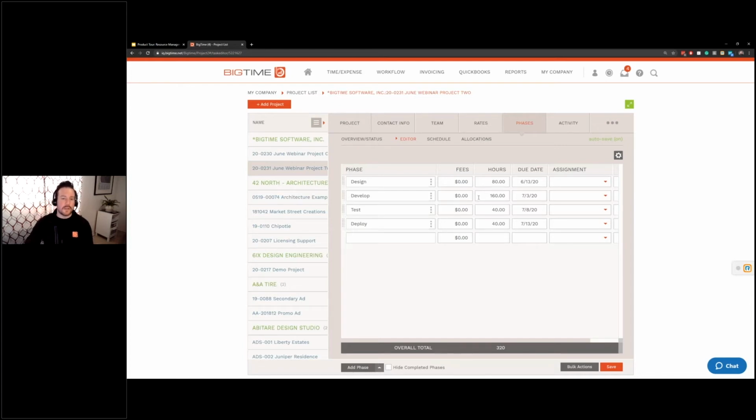But this should be, in the easiest sense, where do the budgets lie on that scope of work? So on this, the initial scope, I know I need about 80 hours for design. I'm gonna do 160 on development, 40 hours for testing, 40 hours for deployment. My due dates are set here already, but I didn't do those manually. I let BigTime take care of those for me.